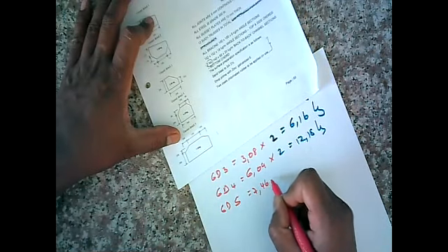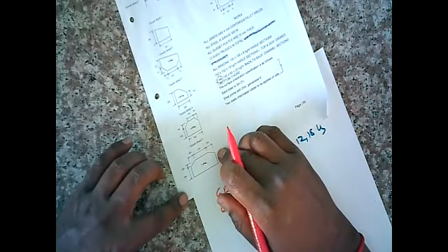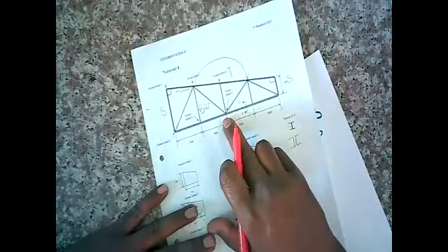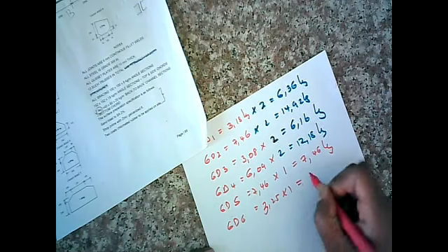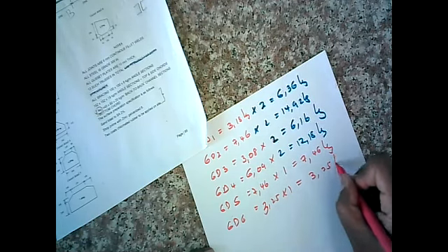All right, let's look at GD5. And GD5 is given as calculated already, conveniently, 4.6. Now, where is GD5? GD5 sits here. Can it sit elsewhere? No. So the factor for that is going to be 1. And you're going to be having 7.46 kg. I think GD6 is the last one. GD6. And where does GD6 sit? There. Now that goes there, that goes there. Is there anywhere else 6 can go? No. So the factor here, also 1. And we're sitting with 3.25 kg.